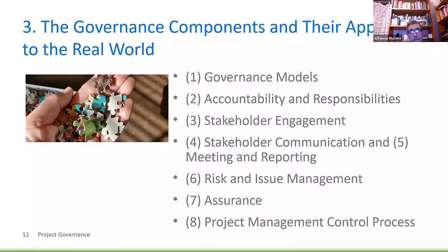And from my particular point of view, stakeholders are very essential. They are anyone who can be impacted by the project deliverables. So the project manager needs to define who the stakeholders are and get an agreement with the project sponsor on what their interests and expectations are, and most important, how to communicate with them. These are very important roles to take into account regarding stakeholder engagement. But as I said, it is crucial.